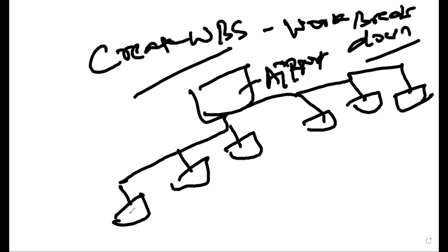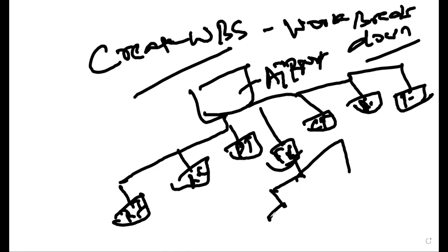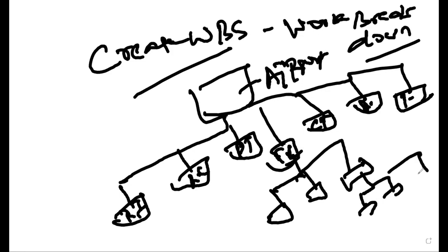So what you're going to do, you are able to break that one into runway infrastructure, runway composition, passenger terminal, cargo terminal, aircraft maintenance, project management, and you're going to bring something called a food court. And the food court is broken into what? It is going to be broken into a Tandoori Express, a Pizza Hut, and a KFC. And the KFC is broken into what? A kitchen, warmer, fryers. And the kitchen is broken into what? Utensils, spoons, sink. So you are breaking that one into more manageable components where you can manage your work.